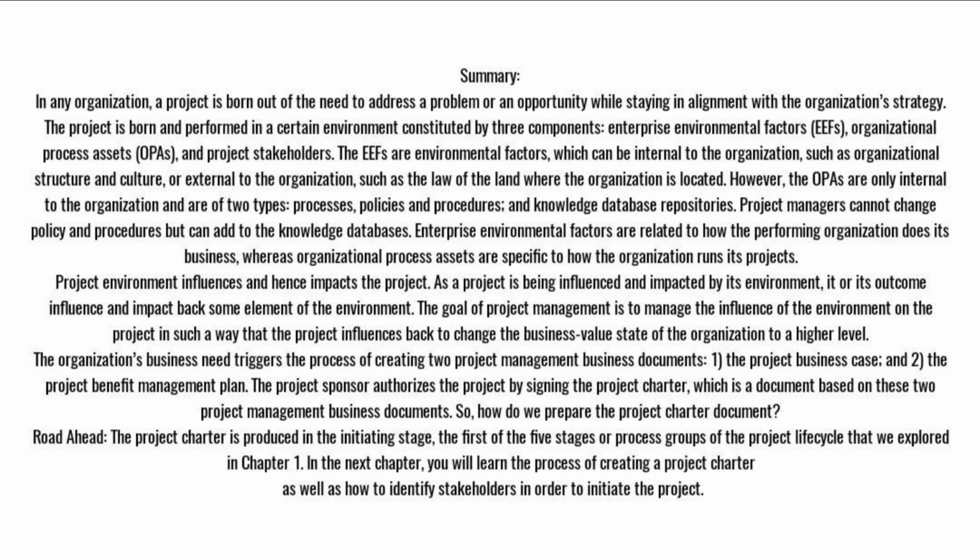The EEFs are environmental factors, which can be internal to the organization, such as organizational structure and culture, or external to the organization, such as the law of the land where the organization is located. However, the OPAs are only internal to the organization and are of 2 types: processes, policies and procedures, and knowledge database repositories. Project managers cannot change policy and procedures but can add to the knowledge databases.